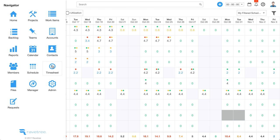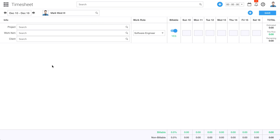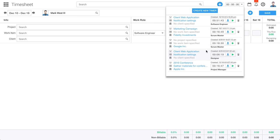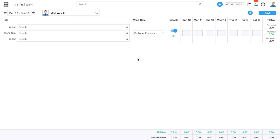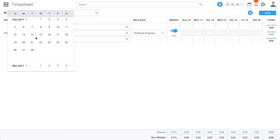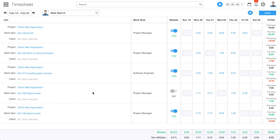Let's go back over here and look at the timesheet now. As you recall, we looked at the timers when we first logged in — the timer widget — and of course we can access those timers up here. That's if you want to keep track of time as you're doing the work. Some people prefer the timesheet approach. Here's a timesheet that's been filled in — we can see we've got a few different items that we're logging time against this week. We can see the work role that we're logging time against. Work roles often have billable rates associated with them. I can see if this time is billable or not, and then how much time I've logged on a given day. Over here on the right, we'll show you the total estimated time for this particular work item, how much time has actually been logged this week, and then how much time we have remaining. This is useful so that each employee can know if they're at risk of going over their original time estimate, and of course you get some summaries down here at the bottom broken down to billable and non-billable time.